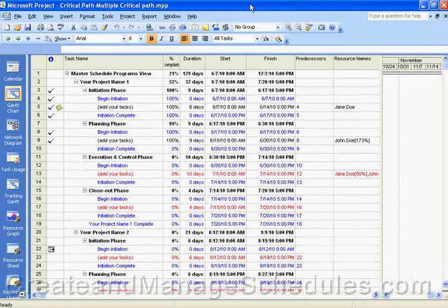So Microsoft Project actually comes with a set of Excel and Visio templates that can easily be used to create visual reports. And how Project does this is by using Excel pivot tables and Visio pivot diagrams to display the information. After you create the report, you can change it directly inside of Excel or Visio software. And the changes that you make in Excel or Visio will not affect your project schedule data.